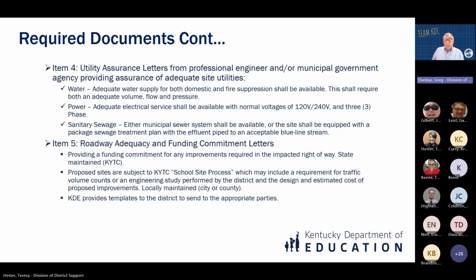These sites are subject to the transportation cabinet school site process, which may include a requirement for traffic volume counts or an engineering study performed by the district, design and the estimated cost of proposed site improvements. It's going to be either state or locally maintained. KDE provides templates to the district. Next slide, please.